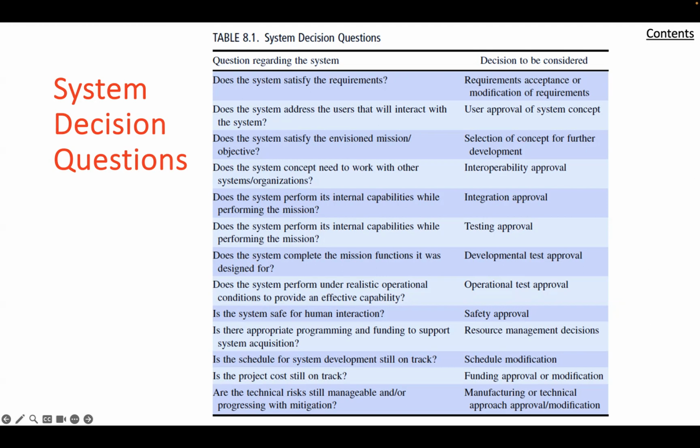So you can refer to the NASA's space flight program and project management requirements for further description of the KDPs. The Department of Homeland Security, DHS, uses an acquisition decision event, ADE, to progress through the system development process. These closely follow the DoD process. The four main phases are justify the need, analyze/select alternatives, obtain the alternatives, and either produce, deploy, and support the capabilities until it is retired. So you can refer to the DHS's Acquisition Management Directive and DHS Instruction Manual for more details.